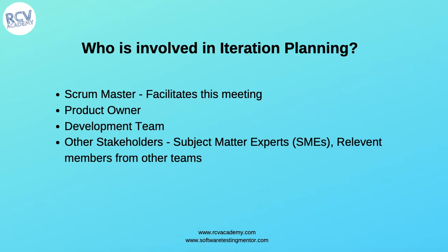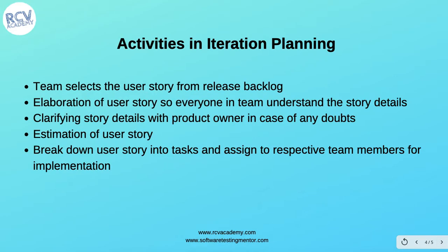The activities in iteration planning start with the team selecting user stories from the release backlog. The Product Owner prioritizes the release backlog and the user stories that need to be picked up in priority order of development. From that release backlog, the team picks the user story and it is then elaborated upon.